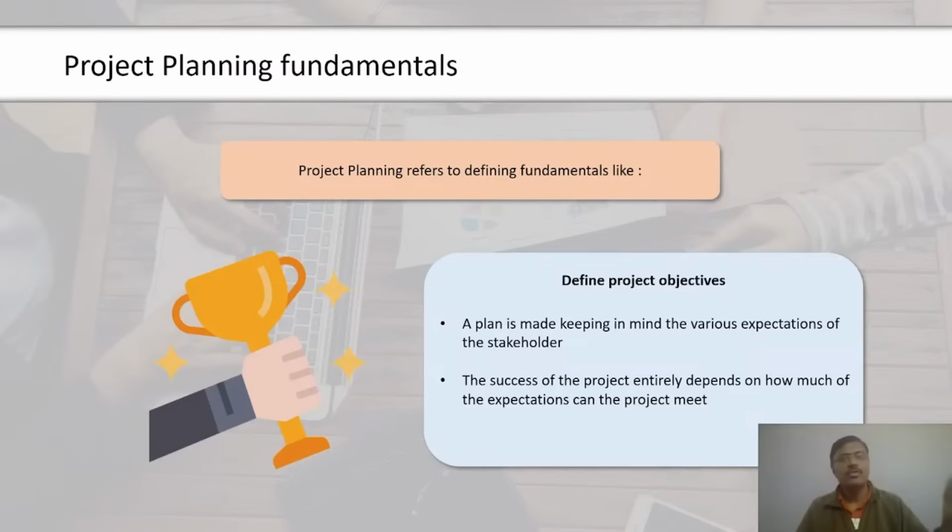Different schedule compression techniques have different impact on the project. The impact of fast track leads to risk additions and increase in management time for the project manager. Crash leads to cost addition and increase in management time for the project manager. Reduced scope, on the other hand, saves cost and resources, but increases customer dissatisfaction. Likewise, reduced quality saves cost and resources, but increases risk. Resource reallocation does not add cost or increase risk. In the next screen, let's look into the other techniques used in scheduling.